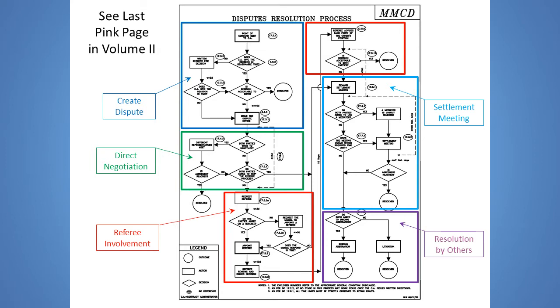To effectively implement these premises, we designed a multi-step process which maximizes the chances that the two parties will come to a resolution before having to get a judge or an arbitrator to impose one. If you have a copy of our Volume 2, look at the last pink page to find this logic flowchart for dispute resolution. To make it simpler to follow, I've boxed the various steps that I will discuss individually. The chart shows where the time deadlines occur and gives the general condition clause number which relates to each step.